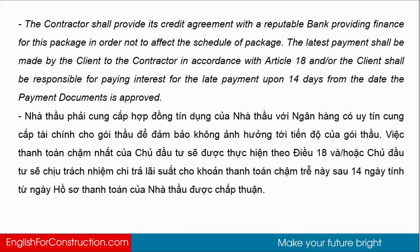The contractor shall provide its credit agreement with a reputable bank providing finance for this package, in order not to affect the schedule of the package. The latest payment shall be made by the client to the contractor in accordance with Article 18, and/or the client shall be responsible for paying interest for late payment upon 14 days from the date the payment document is approved.